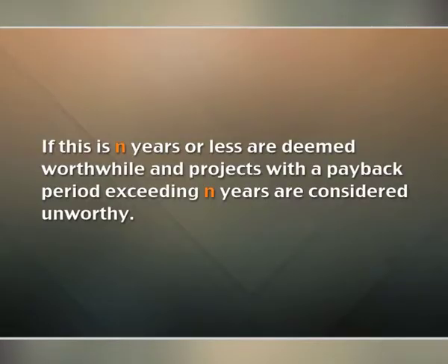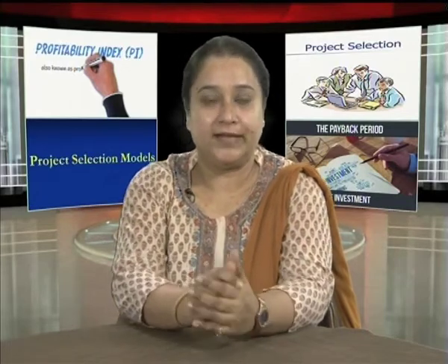Firms using this criterion generally specify the maximum acceptable payback period. If this is n years or less, projects are deemed worthwhile. The projects with a payback period exceeding n years are considered unworthy. Evaluation. A widely used investment criterion, the payback period seems to offer the following advantages.